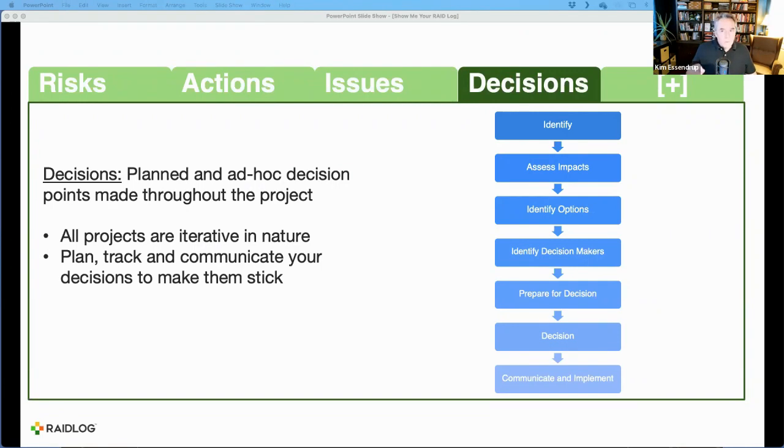But it also may serve as a proper format for undoing some decisions, because if you document a decision appropriately, you can document what were the assumptions and the justification for decisions that were made in the past, because those conditions, those assumptions that were tied to that decision, months or a year later might be completely different. So we might say, well, we used this product because it was the best one on the market. A year later, it might not be the best one on the market. It might be time to go back and change that decision and use another tool to achieve your project. If you don't have that documented, nobody knows why you did it. And it just kind of falls into myth, and we just sort of do the same thing over and over.